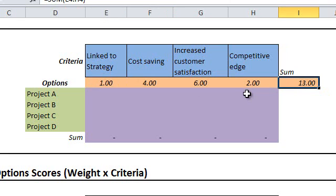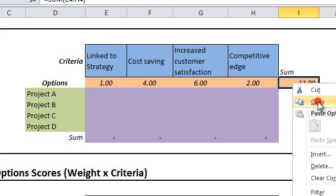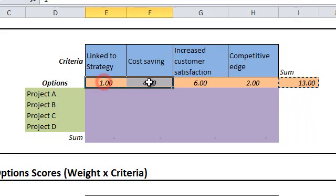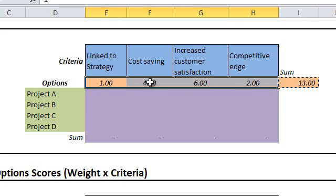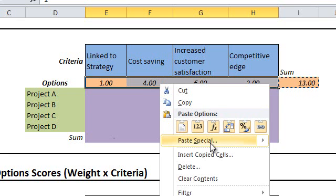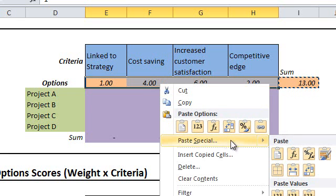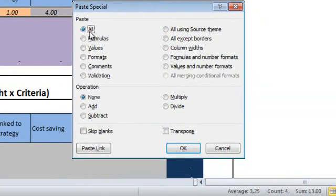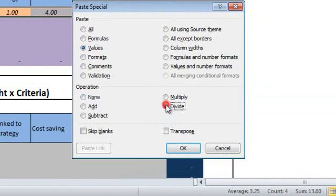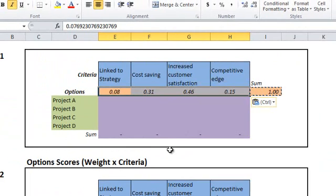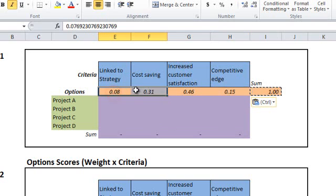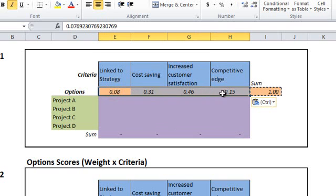So we sum up criteria weights, which is 13 points here, then divide each weight by the sum. I'll use a special trick here to perform the division operation. I'll copy the sum result, then select criteria weights and right-click to paste special. Select paste special, then in the paste group select values, and in the operation group select divide and hit OK.